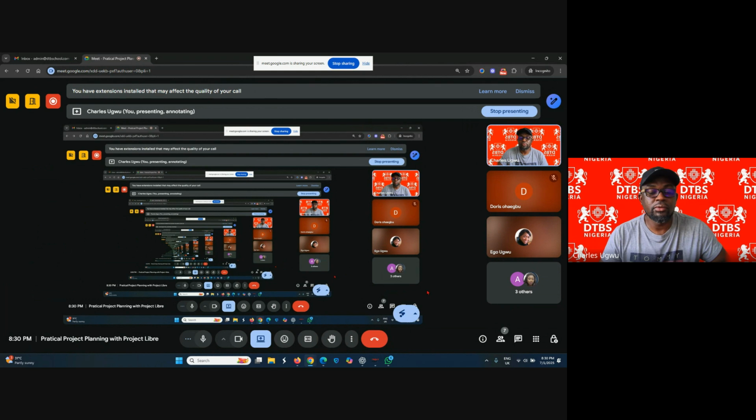You need to capture everything, because if you use the date on the day you created this, what about the money you've spent already? You need to capture everything. So it has to be the date this project starts.